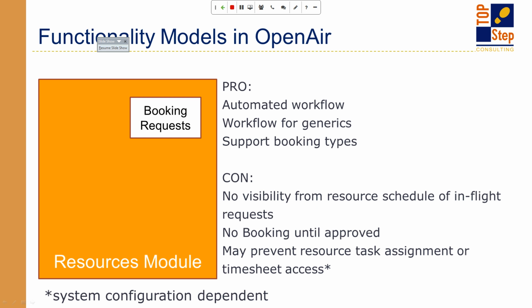And because it does require such a formalized approval process, it doesn't necessarily fit very well with a decentralized model. If you have a project owner who's staffing their own projects and approving their own staffing, there's really no need for a formalized approval process.